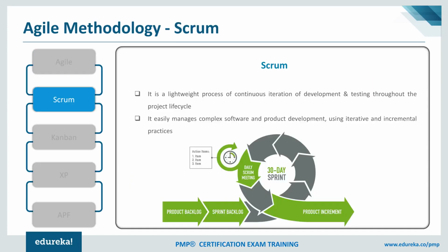Now, Scrum is one of the methodologies within Agile. Scrum is a very, very lightweight framework which helps us in defining the sprints. A sprint is nothing but an iteration in Scrum. The iteration in Scrum could be anywhere between 1 to 4 weeks. And Scrum has defined certain lightweight ceremonies or events that we do, right from sprint planning to meeting on a daily basis as a part of the daily stand-ups. Then we have sprint demos where we actually show the customer what we have built, and we take continuous feedback during the demos, and then we end the sprint by doing the retrospective. So this is what typically happens in that small container of a sprint, which is just 1 to 4 weeks maximum duration.